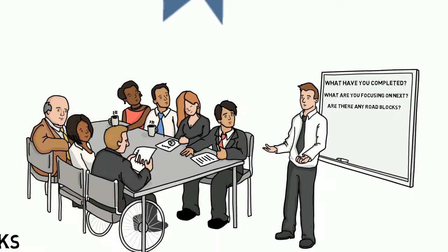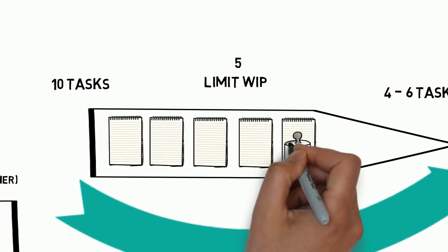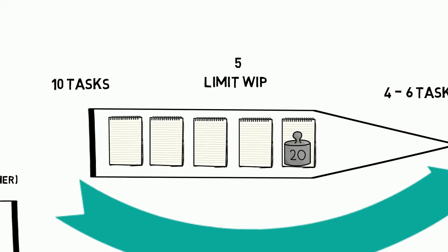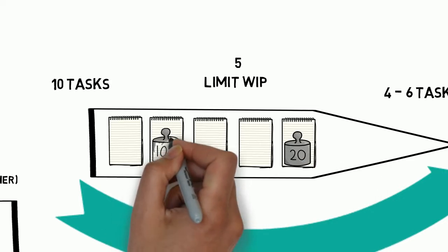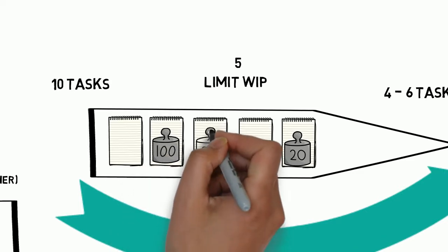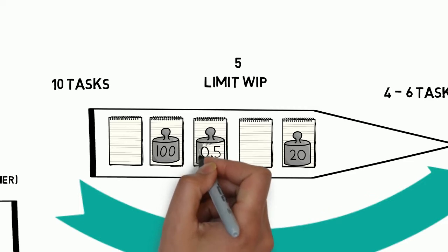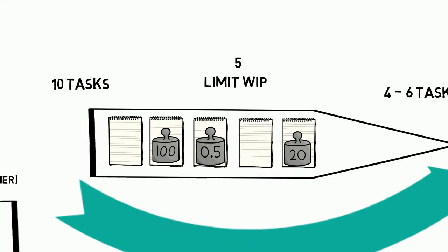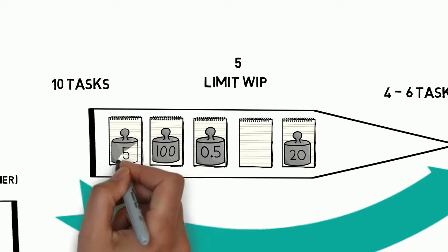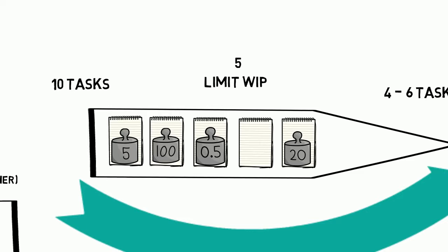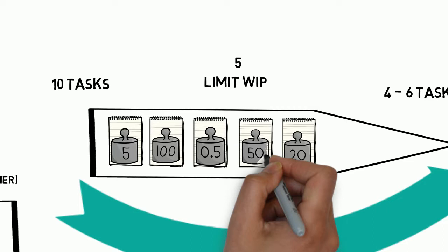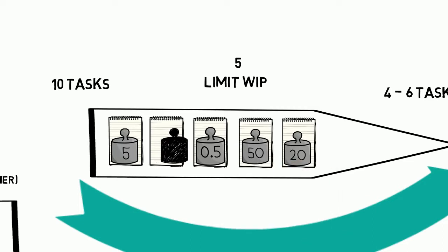To be able to prioritise, the process owner must have some idea of the value of delivering each task as well as the effort required. Some tasks are critically important to the improvement and add most value. Some are small and may add bonus features. Some tasks take just a few hours to do. Some take months. Now, guess what the correlation is between task value and task effort? That's right, none. Bigger does not mean more value.